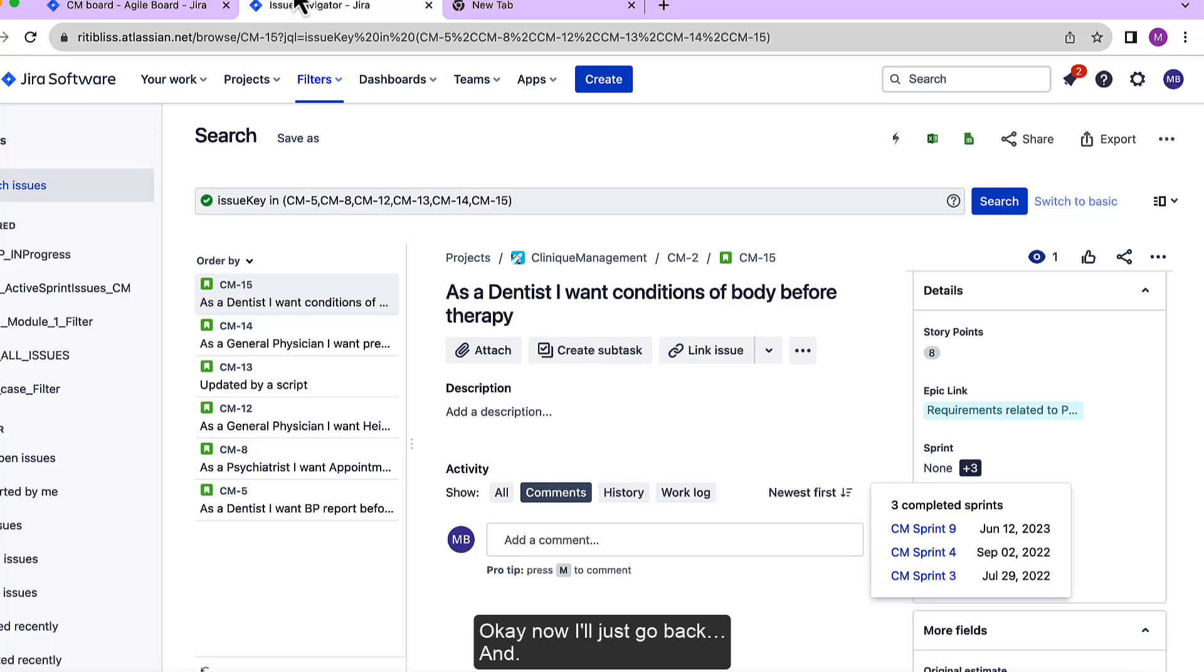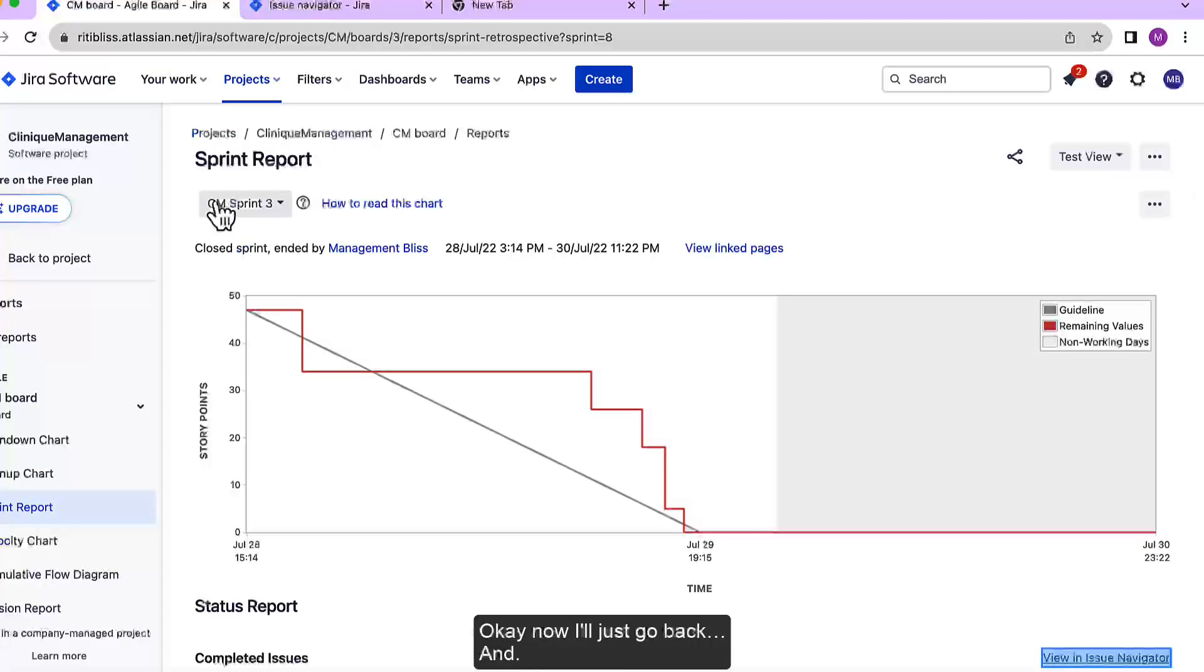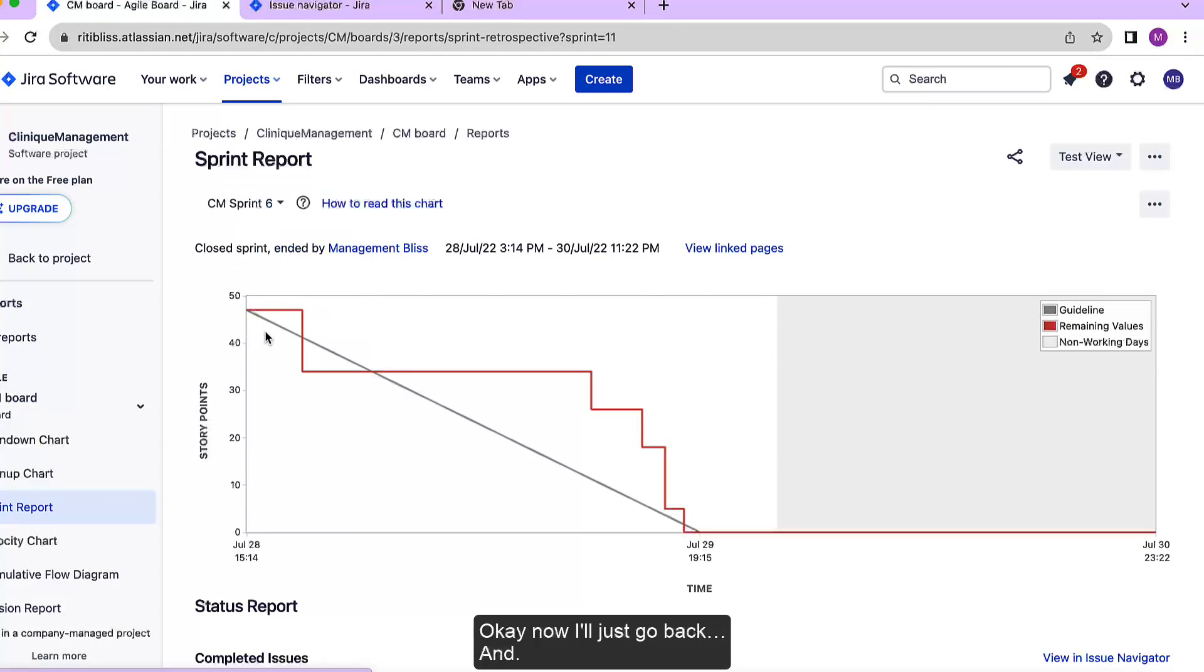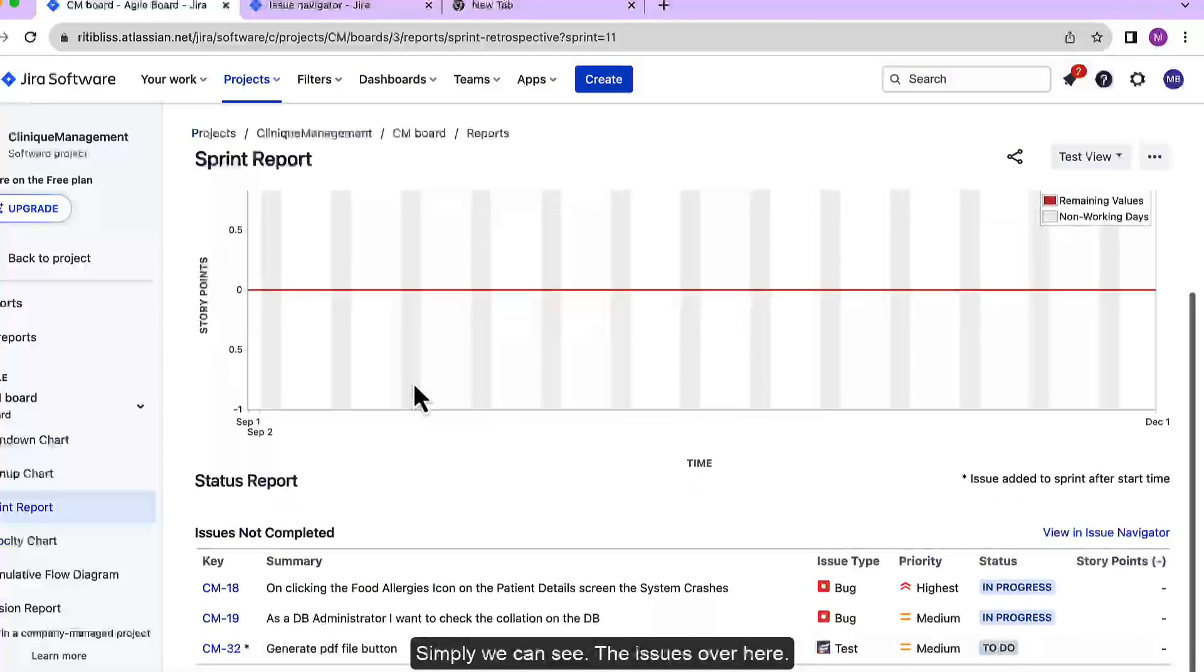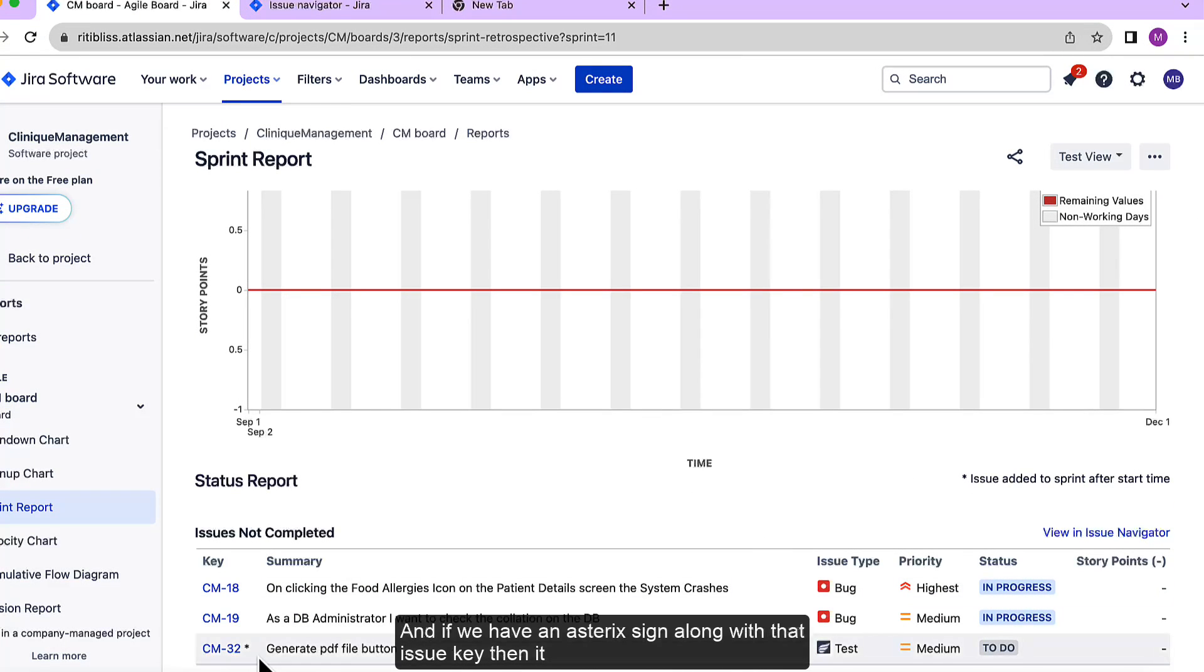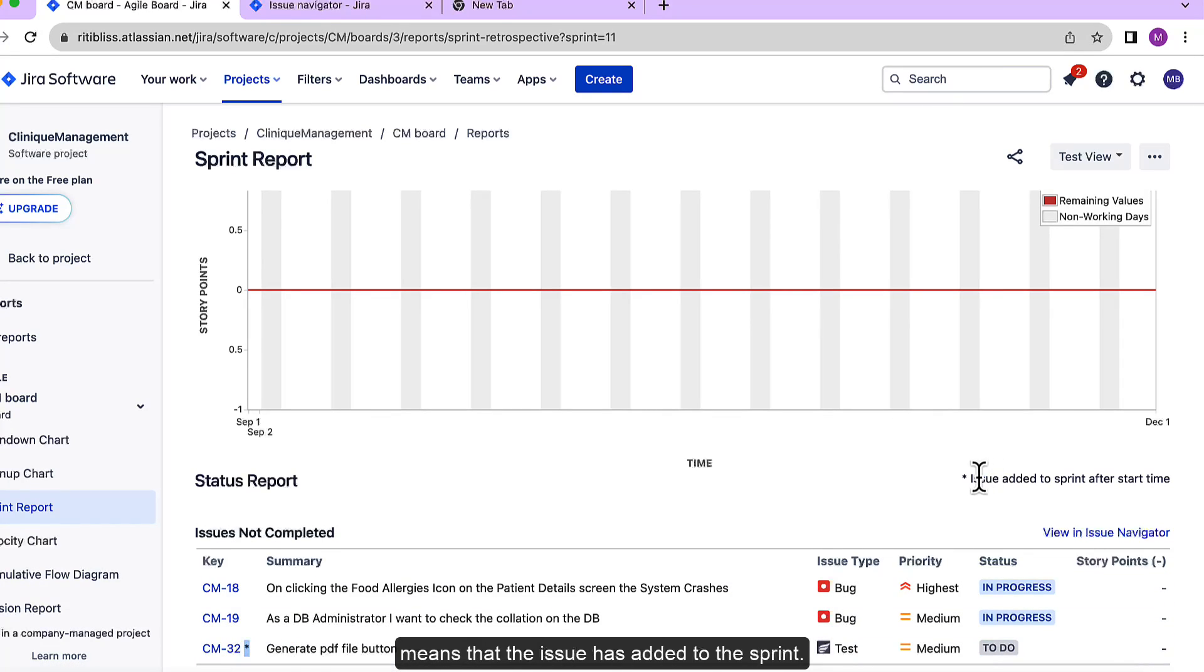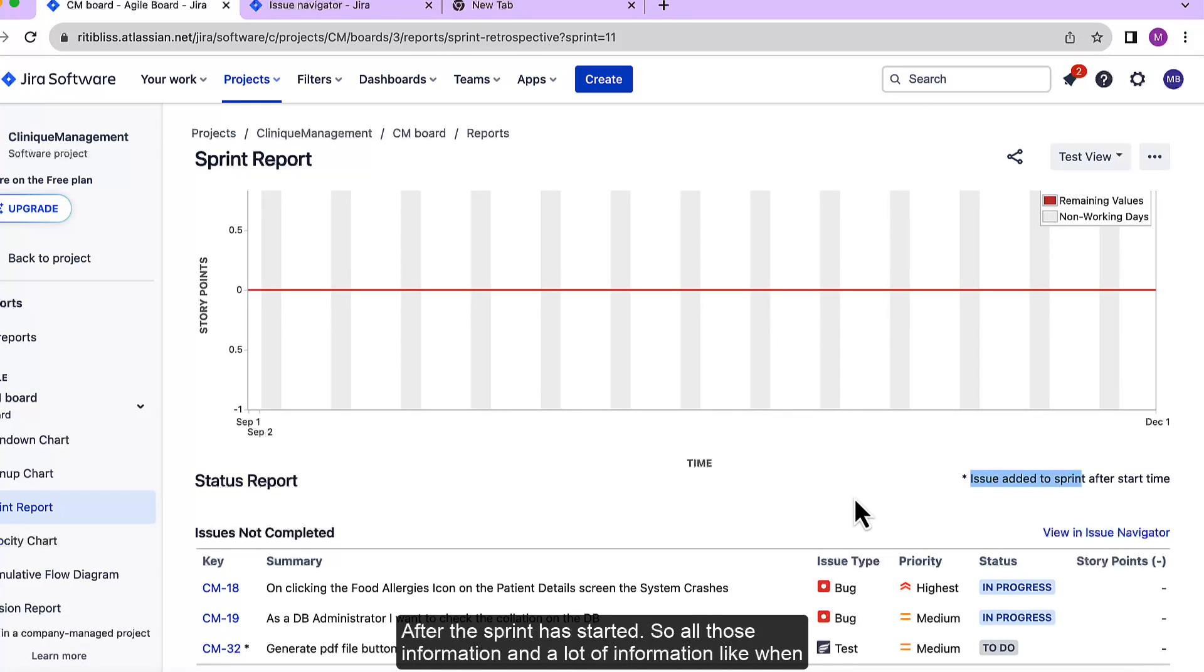Okay, now I'll just go back and simply we can see the issues over here. And if we have an asterisk sign along with our issue key then it means that the issue was added to the sprint after the sprint has started.